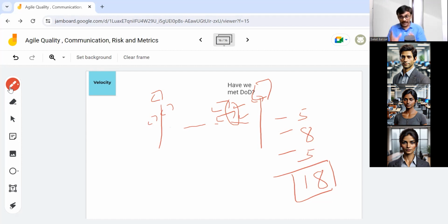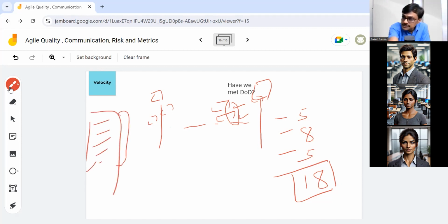And if I have that information, assuming I have lots of requirements and I want to plan how long it will take to finish them, I do a story point estimation. If the total comes to 100 story points, and my average velocity is 20, then I know I will be able to finish this work in 5 iterations.